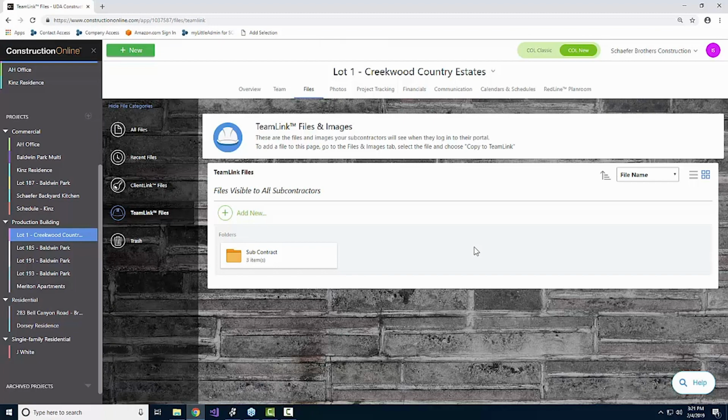This is critical for bidding, because what we're looking at in this case is a way to isolate these bids that we're receiving so that we don't have to worry about collusion. This is, again, very important. We've considered this from a number of different angles, and we want to make sure that they can't see each other until you add them to it. Or, strike that. Not until you share that contact information for anybody else that might be on there.